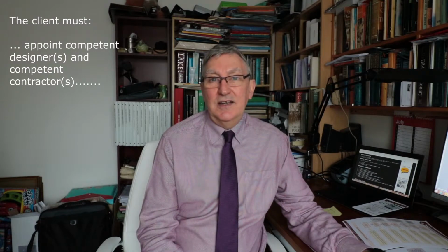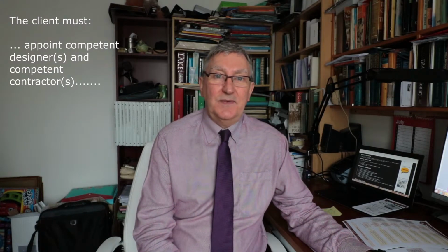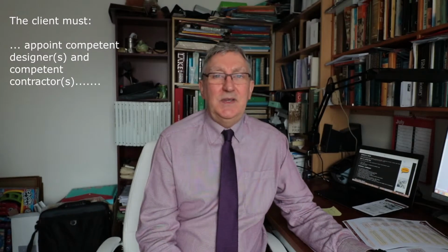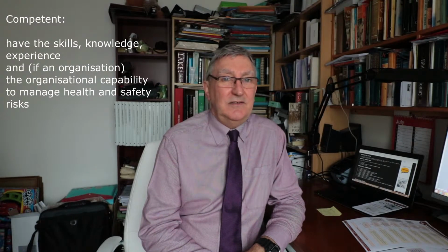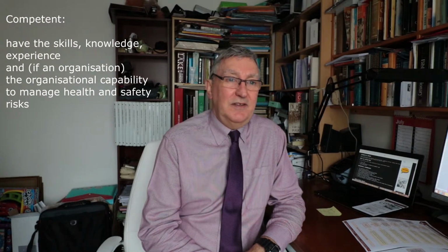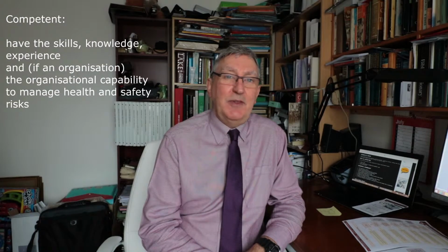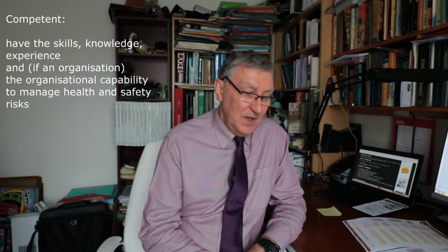The client must appoint a competent designer and a competent contractor. If they fail to do so, they must assume those duties themselves. Competent means that the individual or the company has the necessary skills, knowledge and experience and other abilities to enable them to perform their functions.